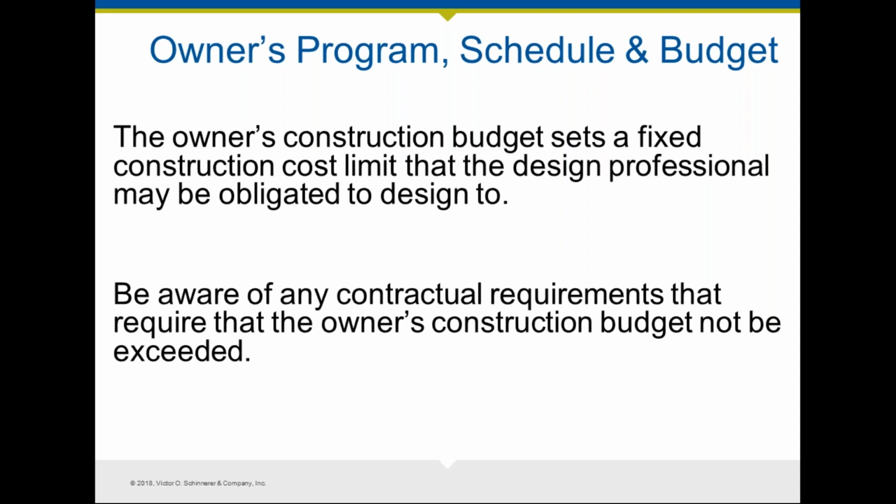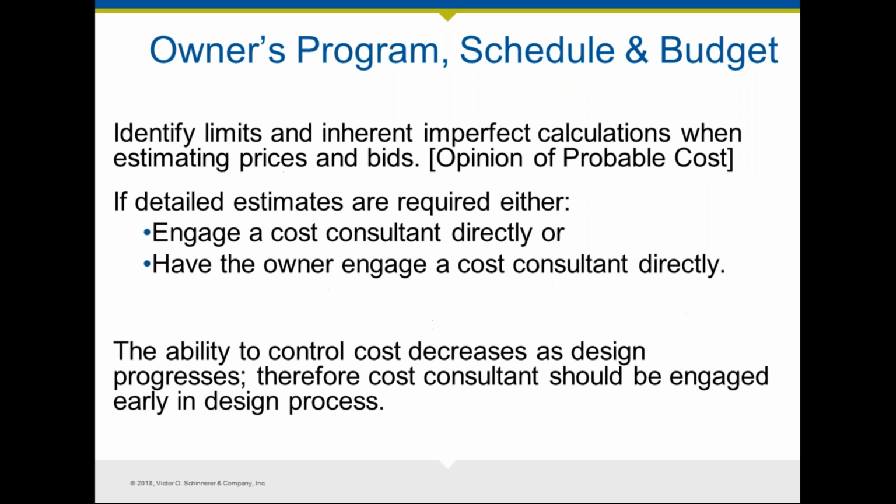on what is reasonable. When it comes to cost, you should really advise the owner that your services, when it comes to construction costs, are often characterized as an opinion of probable construction costs. You're not in the business, generally speaking, of providing detailed cost estimates.